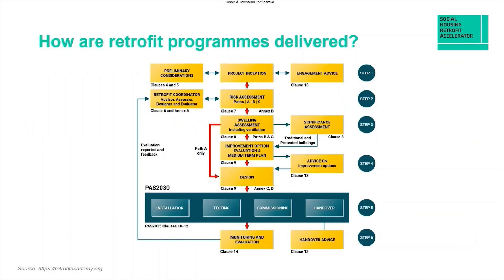So what are the key stages for retrofit delivery? On screen is the PAS 2035 framework for delivery, and this must be followed for a retrofit project to achieve compliance. A detailed delivery plan will help ensure that a retrofit project is delivered smoothly and successfully, helping control timescales and budget and managing expectations with internal and external stakeholders. There are other processes that will need to be considered in-house before engaging with the PAS process, such as reviewing housing stock and other asset data. The first of the six key steps of the PAS 2035 retrofit process is identifying intended outcomes and key project objectives at the outset.